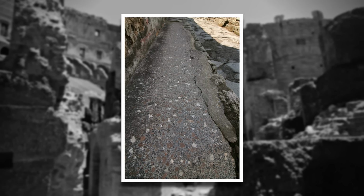Besides its strength and durability, Roman concrete had the great virtue of being cheap. All the materials were available locally, and, unlike masonry, a large concrete structure could be built largely with unskilled labor. By my best estimate, the upper and lower foundations together used roughly 250,000 cubic meters of rubble and concrete.